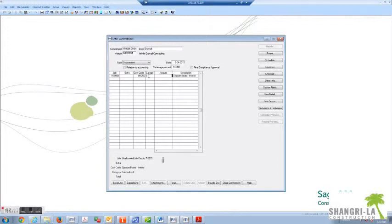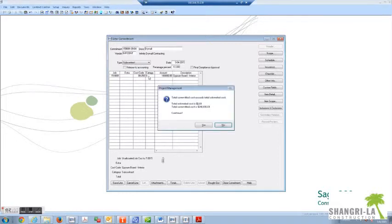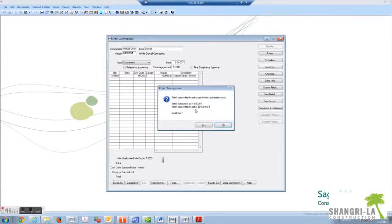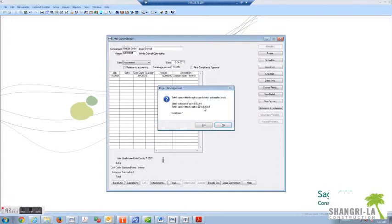And then go to the amount, enter the amount. In this subcontract I'm going to enter something over $25,000. On occasion you'll get this warning which is saying that your commitment is more than your estimated cost. Estimated cost is a separate training, but this is a good warning that you should go to the project manager or whomever estimated this and see why we are committing something more than what we estimated. I'm going to continue, but again this is a warning where you should stop and ask some questions.